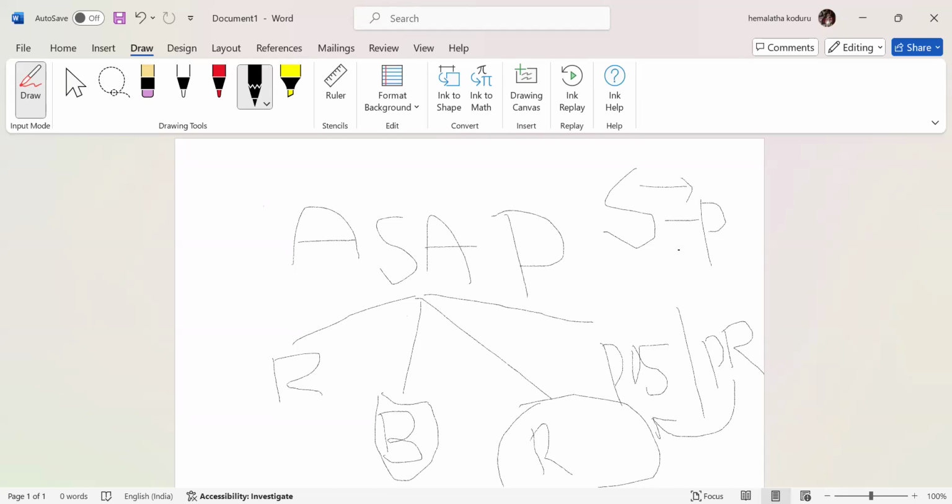They might have expectations. So you just do it in the sandbox, play around, and you can even create the transport request for this, and you can save it. You can try to post some transactions, to see whether it is working properly or not. This is basically given in the initial project phase, when the project starts. This system is your playground system, where you can do some prototyping and testing.